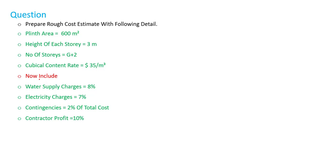You need to include water supply charges as 8%, electricity charges as 7%, contingencies as 2% of total cost — normally we take 3 to 5% but here it is given as 2% — and contractor profit as 10%.